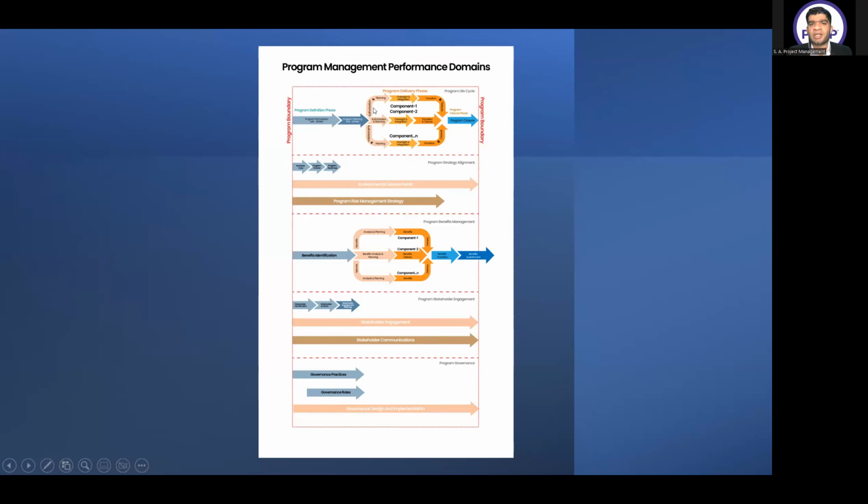The responsibility lies with the component managers in coordination with the program manager, because every project, every component will have its own project manager, just like PMP. In PMP, who was making the charter, who was working and everything for their component is the responsibility of the relevant component manager, with overall supervision and support from the program manager, because he is under your umbrella of the program. But the life cycle of the complete component will be the responsibility of the project manager.